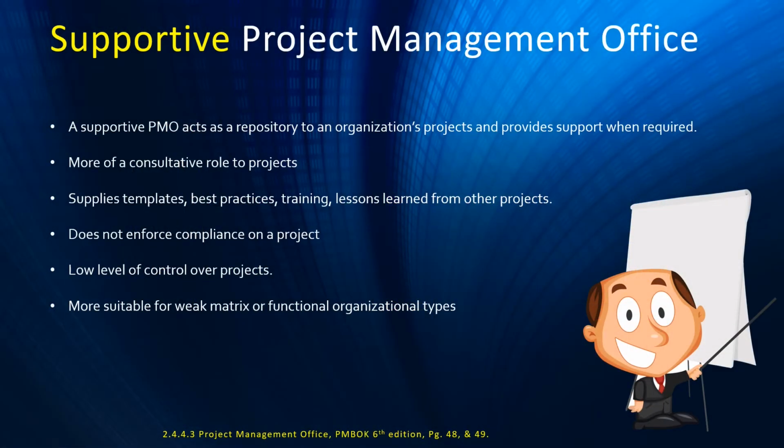Alright, let's first look at the supportive PMO, the supportive project management office. What do they do and how do they compare and contrast to the other PMOs? The supportive PMO mainly acts as a repository, and they have a very low level of control over projects. The main thing they work on is providing assistance through templates, best practices, lessons learned, and trainings. They don't get further involved in the project manager's life or the project life cycle other than that supportive, consultative role.